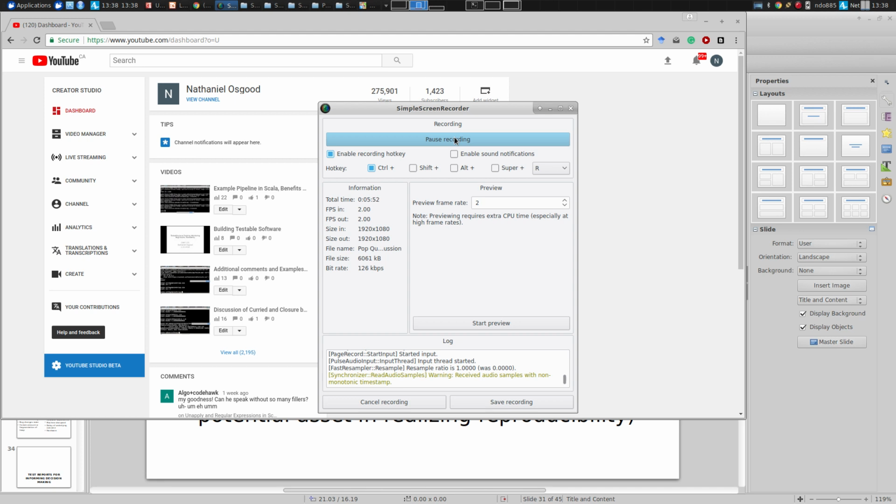A lot of these early things, the requirements, the design document, architecture, those things have really disproportionate impact in terms of code. If something's really off in terms of them, there's a lot of work which has got to be redone often. Code rewritten, test cases may be redone. If it's requirements that are off, maybe you need to redo the design document, right, or parts of it. So these things have big ramifications.